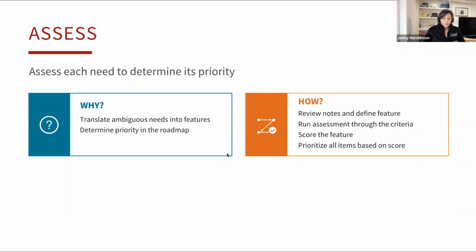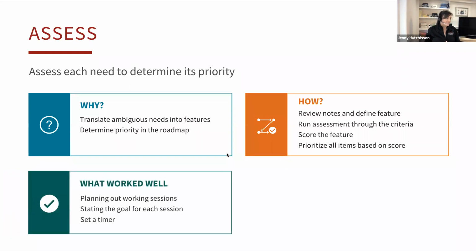So for example, business impact was one of ours. We had, I think, 7 different criteria under business impact. If you gave it a score of 1 to 4, how well did something ladder up to that? You could check off, does it increase revenue? Okay. Does it increase efficiency? Great. Does it help us communicate better? Awesome. Okay. Well, that's probably more like a 3 out of 4 or a 4 out of 4 versus something that, I don't know, only improves efficiency. And then you're going to prioritize based on those scores that you give all of your projects.